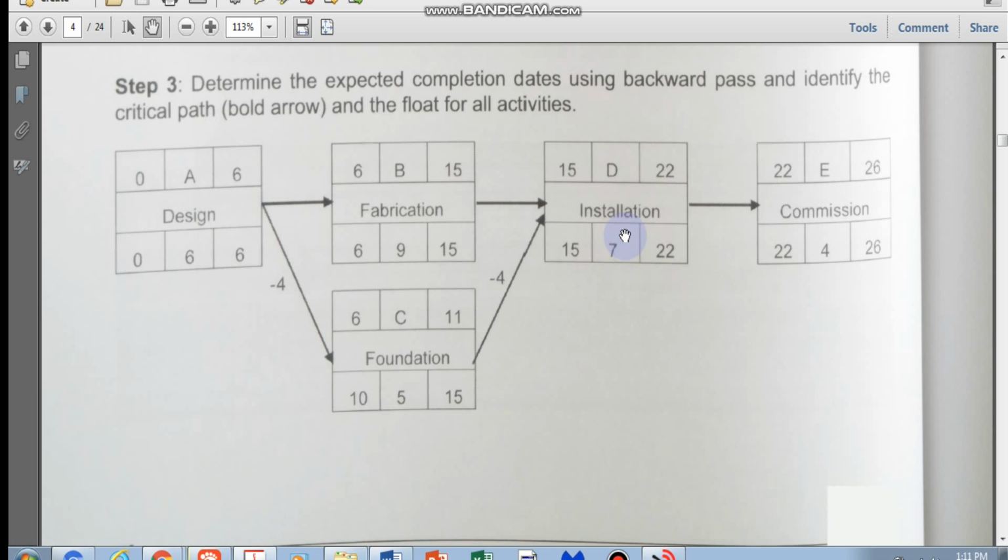Or, like I say, this can be just one particular activity. You can send these 3 guys to do concreting for drainage work. Maybe there's something happening over there where you need some concreters and bar benders. So very easily you can send them over to that site and get them to work there without delaying the foundation, because you've got 4 days extra here.